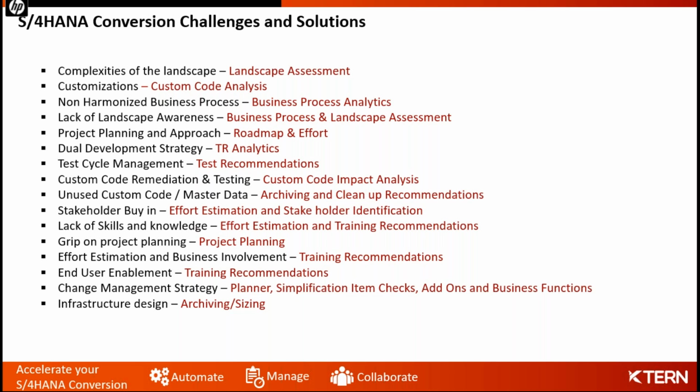The biggest impact I would see here is how it helps us do the effort estimation, and also identifies the stakeholders who should take part in the testing and in the custom code remediation. Because once you have developed a lot of custom code, there would be some history behind what is done. Many customers do have this documentation, but definitely getting involved with people who developed the application would help us understand this a lot better. And with respect to project planning, you're able to get a complete L1 plan at the end of an assessment exercise, and training recommendations on areas that the end users should be trained on.